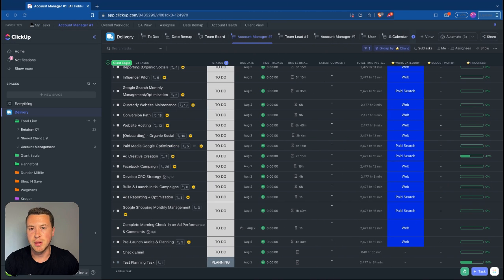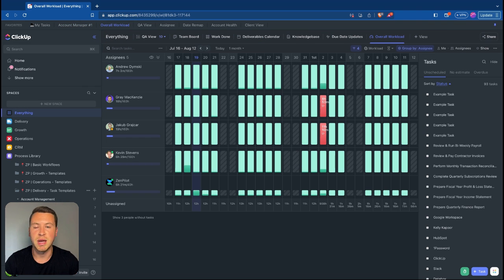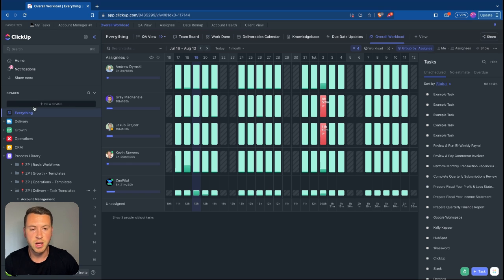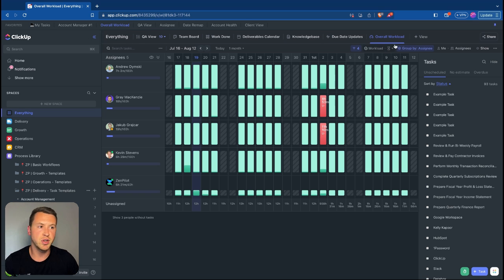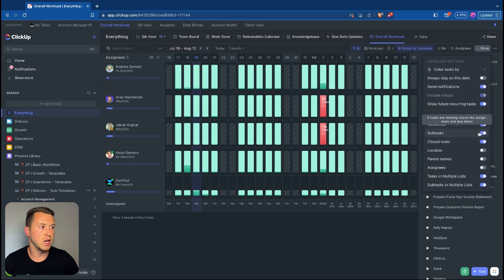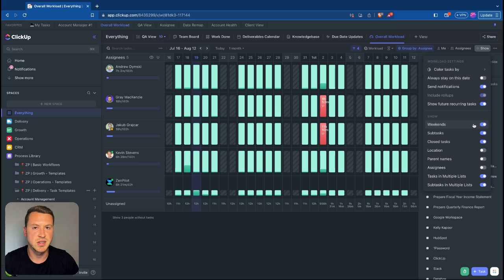After account management views, we need to think about project managers. Project managers need to see capacity and be able to assign and remap work. The key view here is the workload view, which can be created at the everything level — or at delivery, growth, operations, or wherever you want — but building it at the everything level lets you see work across your whole workspace. One important setting: whenever you create this view, go into 'show' and turn on subtasks. A lot of times people build this and wonder why nothing is showing — you need to show those subtasks.